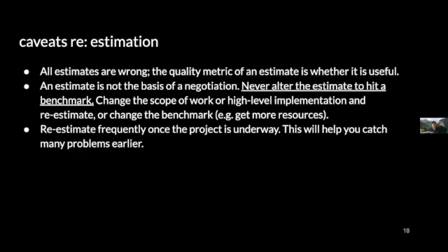Because things will become more certain over time, you should re-estimate periodically throughout the project, because you will have more information, and you'll be able to do a better job. Re-estimation also allows you to know if you're running way off the rails, especially once resources have been allocated. If you find suddenly that in order to even achieve project success, you're going to need more money than you have left, then something's going to need to change. You either will need to change your ambitions for the project or request more money if that's possible.